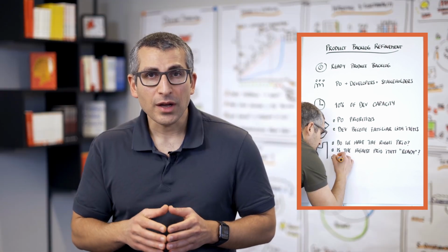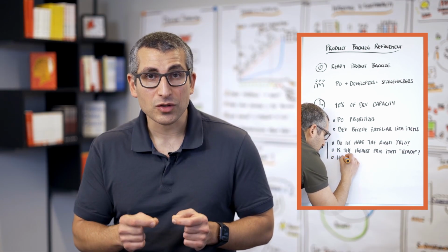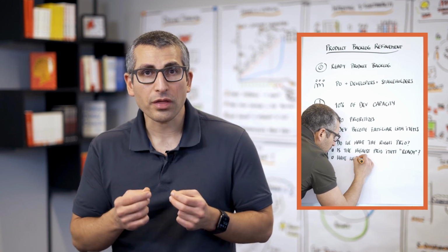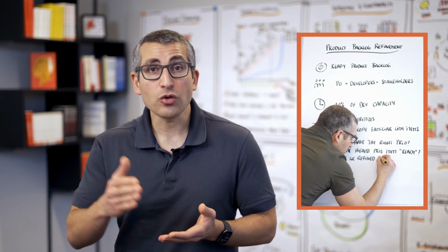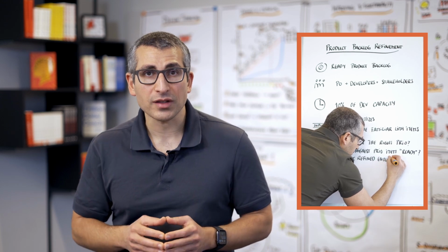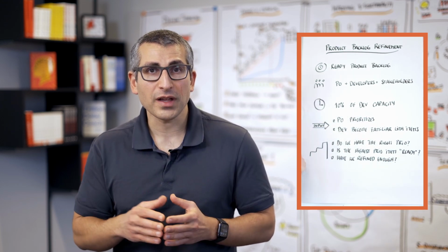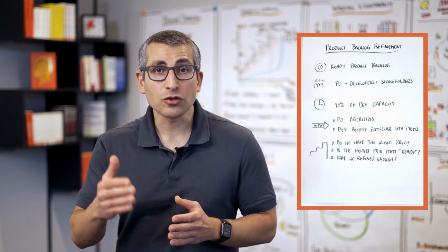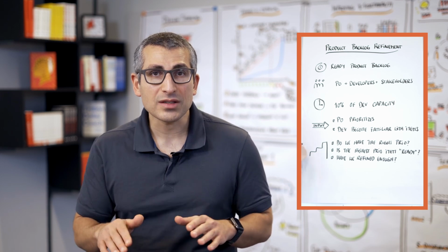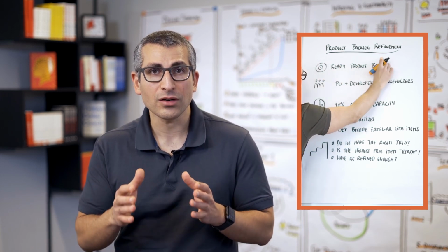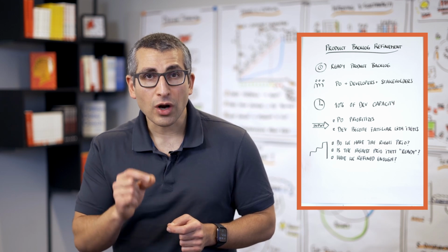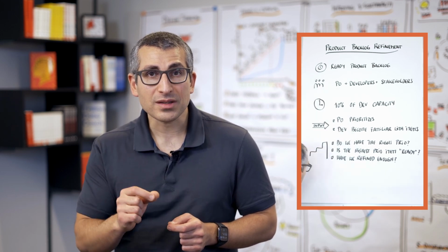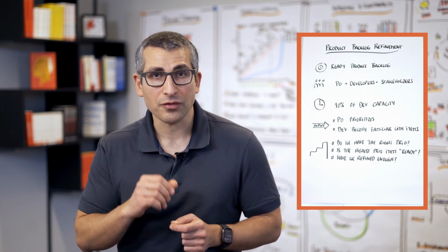In the third step, we would look at how many items, or how many points worth of items, we have already refined. If that goes beyond our existing velocity, or maybe 2x of that velocity if we're planning 2 sprints ahead, then we can stop refinement right here, right now. Because our objective is to do product backlog refinement just in time and just enough.